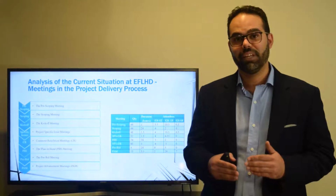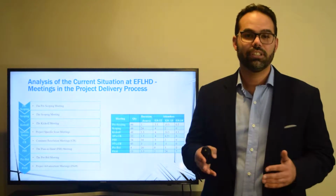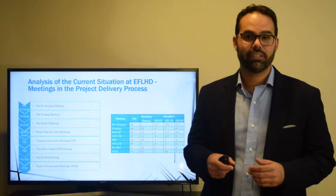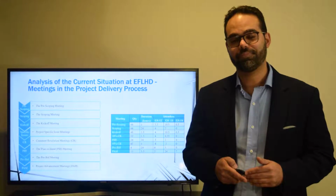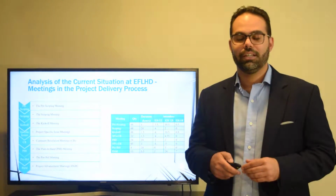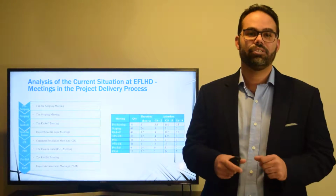You have planning meetings at 70%, in which the team goes to the site with the partner to discuss the design at 70%. During the procurement process, you can have pre-bid meetings in complex projects where you give the opportunity for contractors to ask questions about the project they're proposing and bidding. And you have the project advancement meeting, which is a monthly meeting in which all the managers get together to discuss